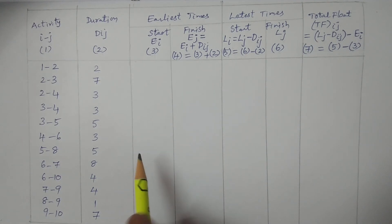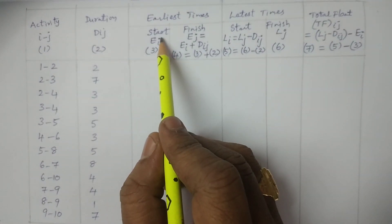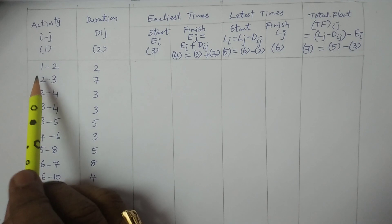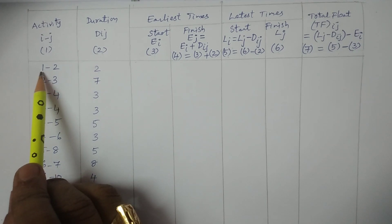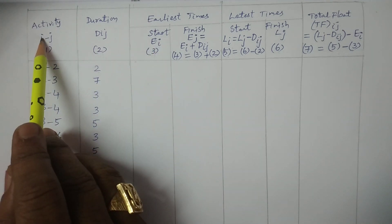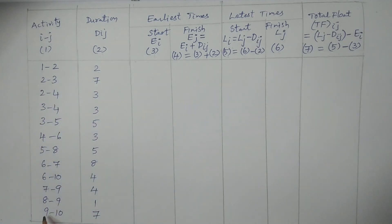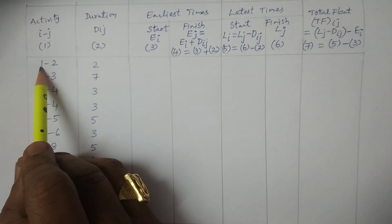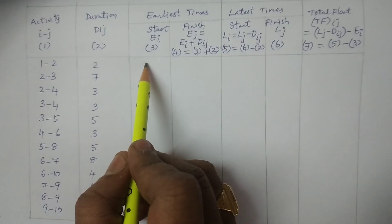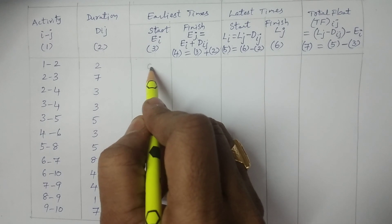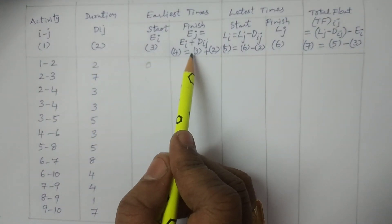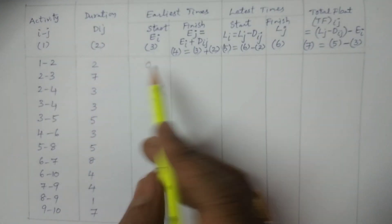Now start the calculations. First, for EI: always observe what events are here. EI means I; these are the values of I, and J values follow. E1 value is considered as 0. EJ equals addition of the second and third columns: 0 plus 2 equals 2. So EJ where J equals 2 gives E2 equals 2.